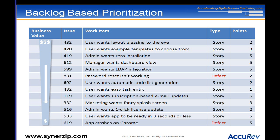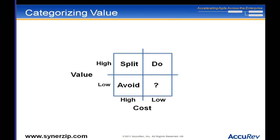I can look at all the stuff in my backlog and say some are high value, some are low value, some are high cost, some are low cost. For example: one story is very high value, another is low value, and they're both low cost — which one should I do? Clearly the one with high value and low cost. But then it gets more complicated.